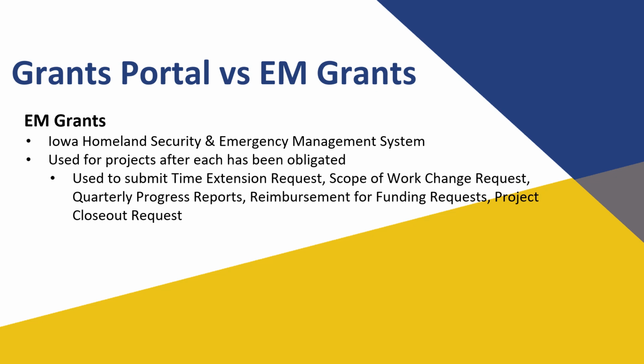EM Grants, on the other hand, is used by HSCMD to monitor your progress after a project is obligated. You may also hear it referred to as MB3, its previous name, or by its URL, which is my.iowa.homelandsecurity.org. HSCMD is required to track and monitor all funds that pass through our agency. Shortly after a project is obligated in FEMA Grants Portal, it is imported into EM Grants and progress monitoring begins. HSCMD will be asking for any and all documentation needed to verify the scope of work was completed as written and the costs incurred are in alignment.